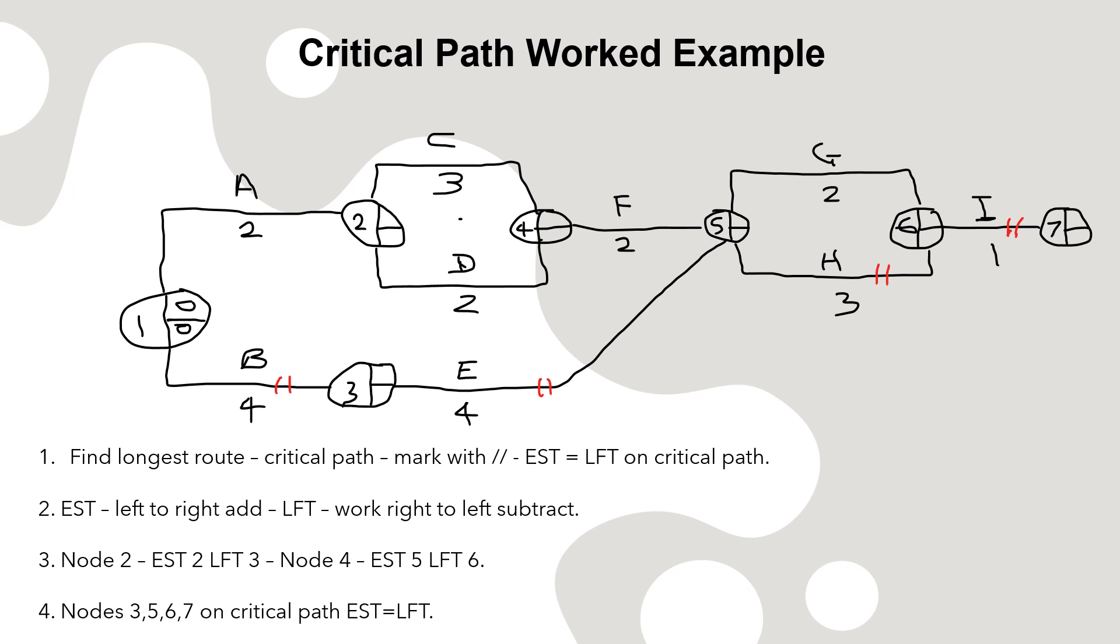Once you've got a critical path, it then becomes easy. To work out node four, node two - if you go from node one, you add. So node two becomes two. Activity C is three. Again, add - two plus three is five. Now work backwards from four. Four take two is two, and you've completed the diagram.